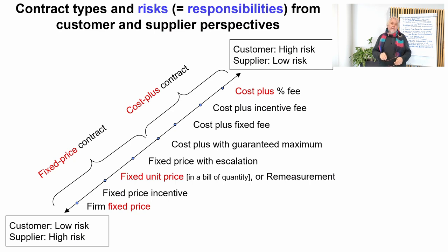And in this way, the supplier carries the price risk, because he commits to a fixed unit price, but the buyer then carries the quantity risk, because it could be that they could not have calculated in advance how much readily made foundation work needed to be done. Because, for example, the size of the house was not known before they started the work, or something like that. Okay.